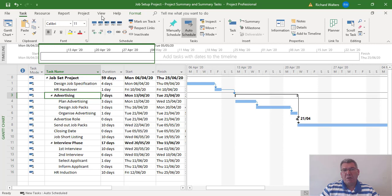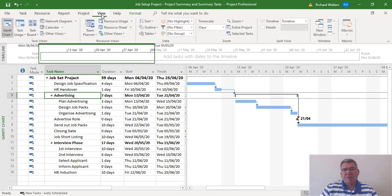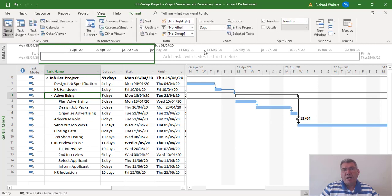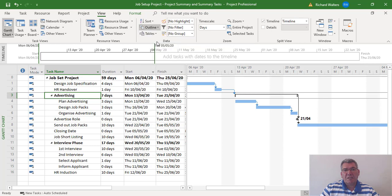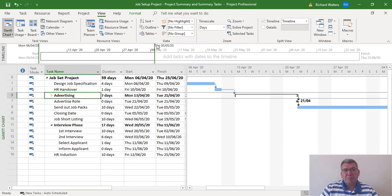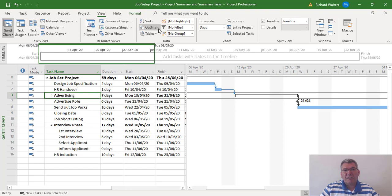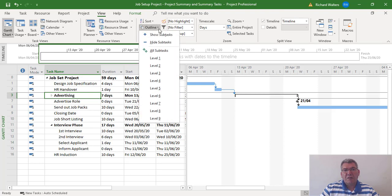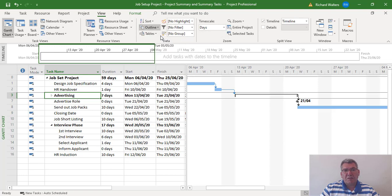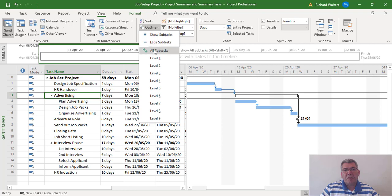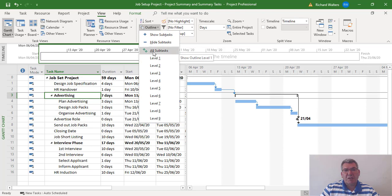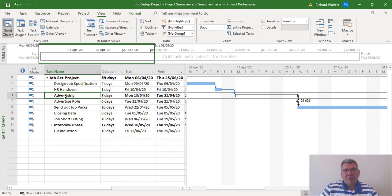We can do this through the View tab and by going through the outline area. We can then click on hide subtasks, or we can show subtasks, or we can go to level one for all subtasks. There's different ways of doing that, and level one takes you to the highest level and has now effectively gotten rid of the detail.